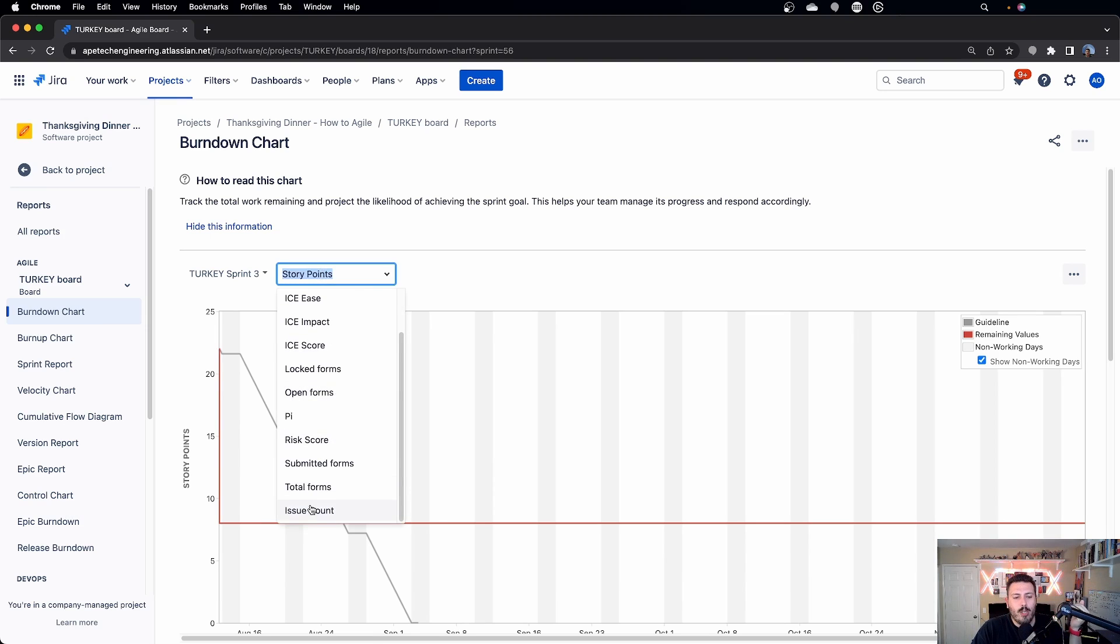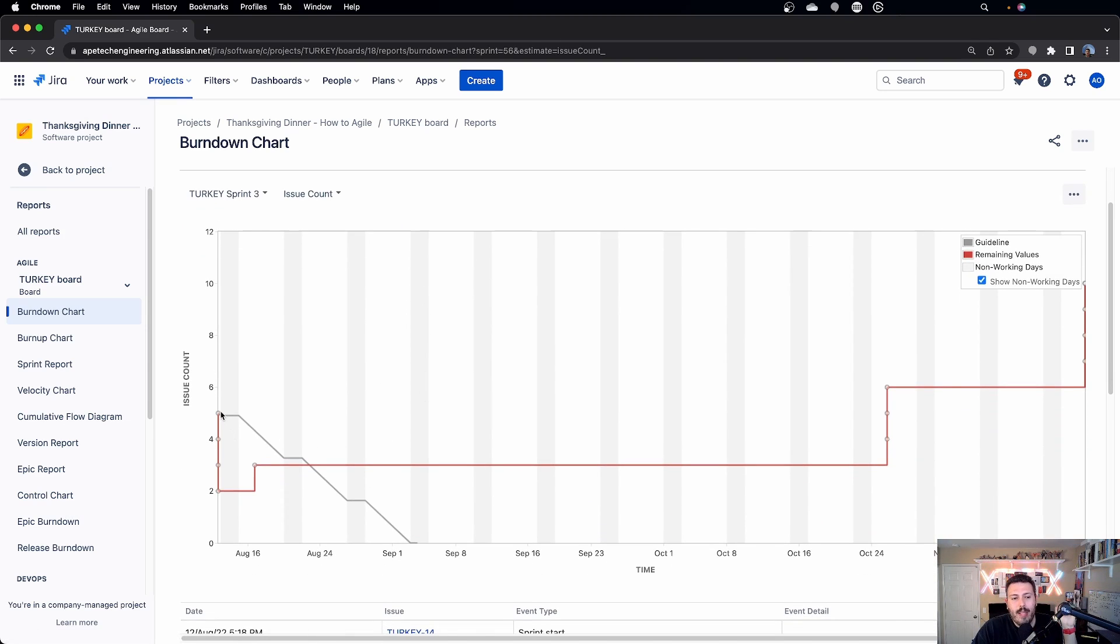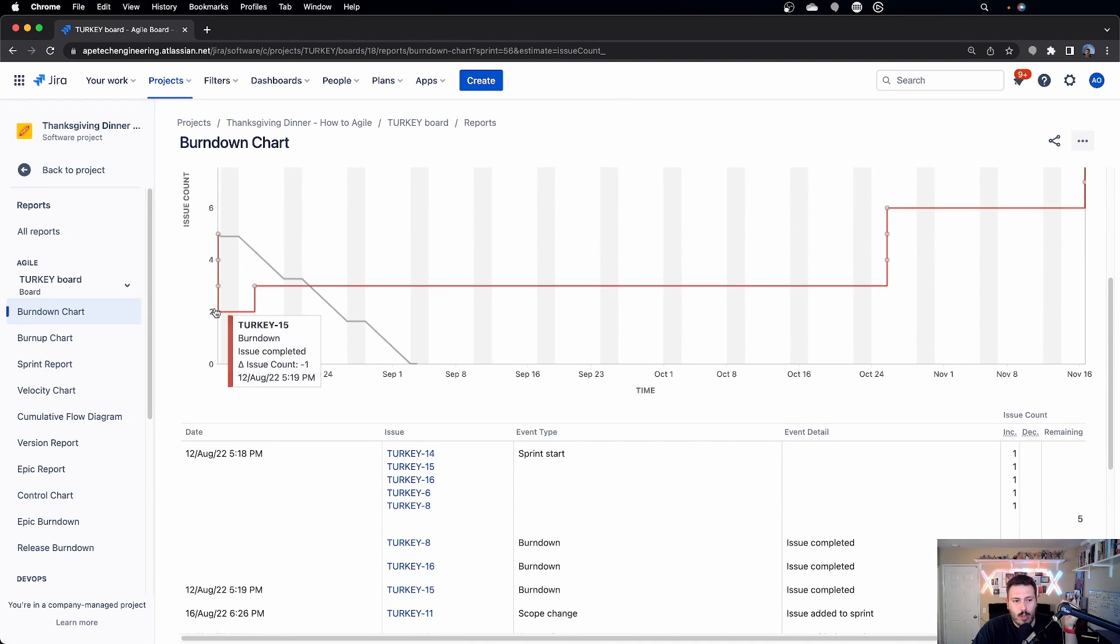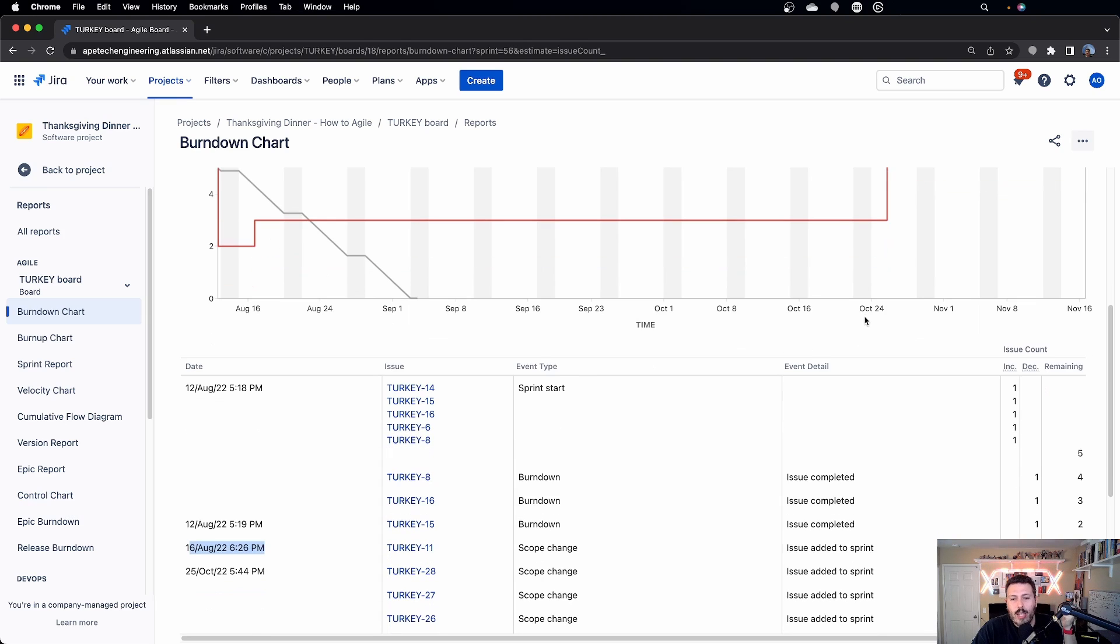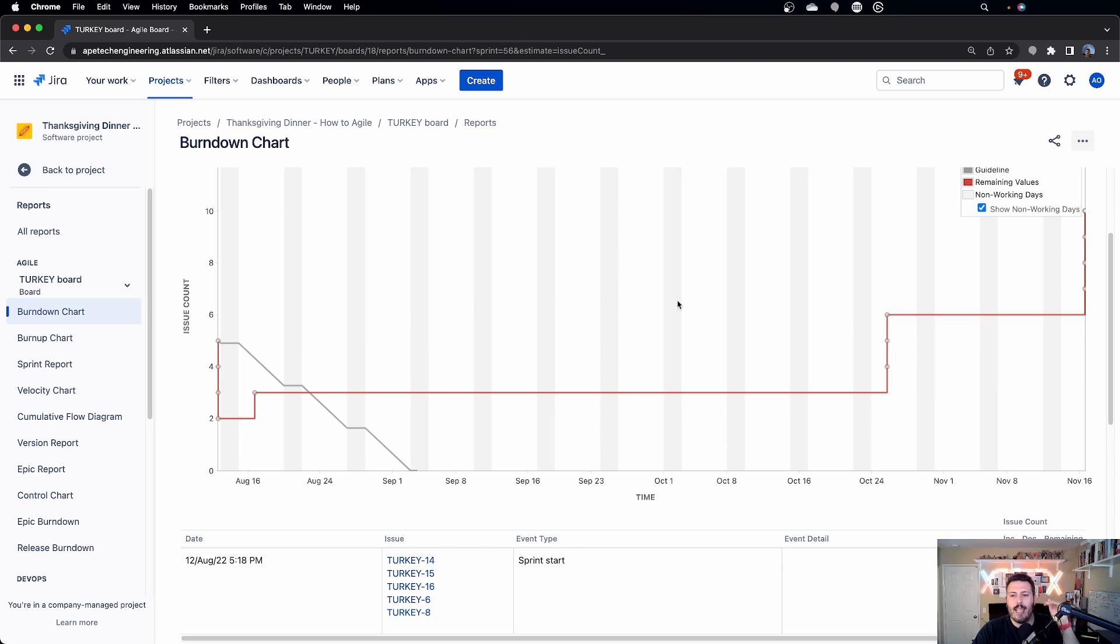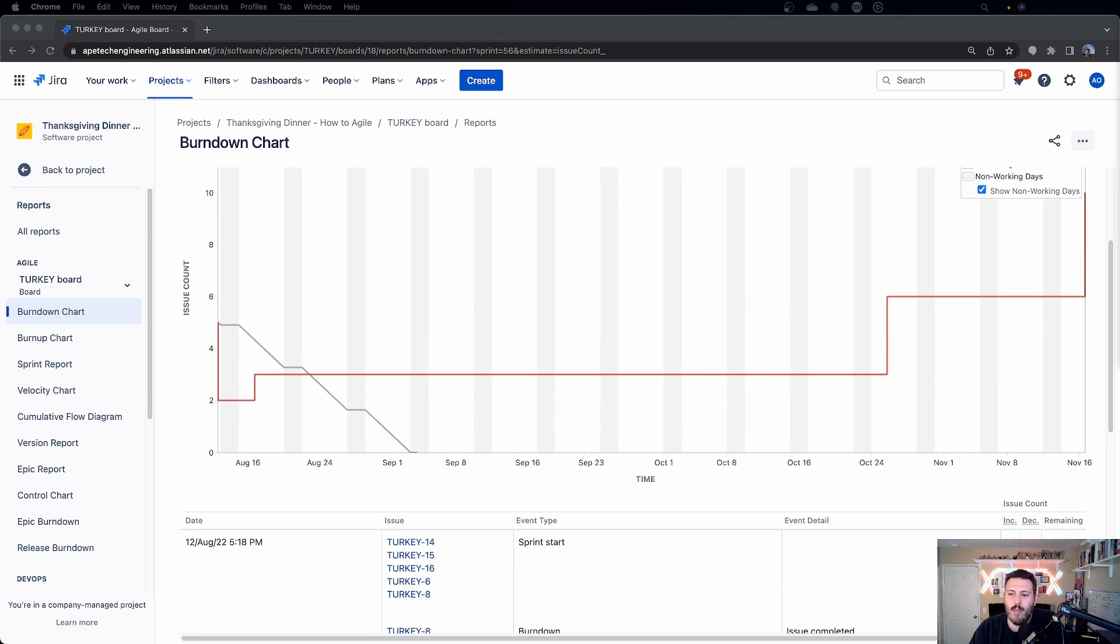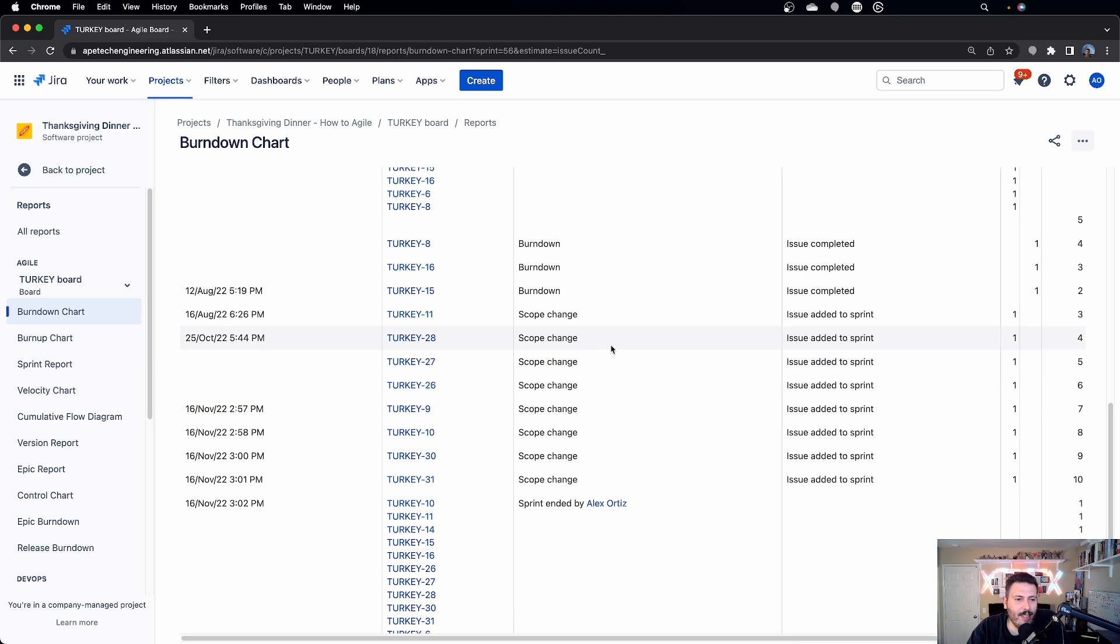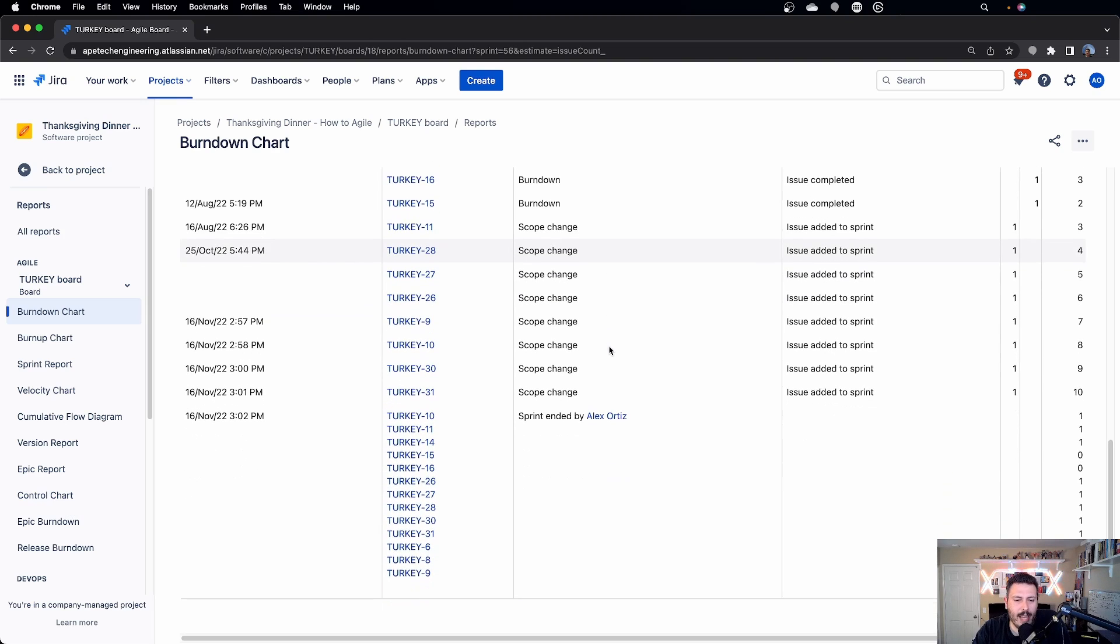If I switch over to issue count, this graph looks different because it'll tell me that I started off with five issues, and then I burned down three. So I came down from five to two, a couple of days passed, and then I increased. I added one issue. So you see that here on August 16th, I added one issue. And then you see that all the way into October 25th, which happens where the heck over here, we added three issues. And so you can see that. So from here, we went from two all the way back up to five. And so now we're back at that level. So this view here will kind of give you a better representation of what's actually happening. Again, it's really cool. In my opinion, I like it because it's telling me every in and every out. And if there's ever any question of doubt or confusion, or if you think somebody's not telling the truth type of thing, you can always come to your burndown chart and essentially figure out what the heck happened.